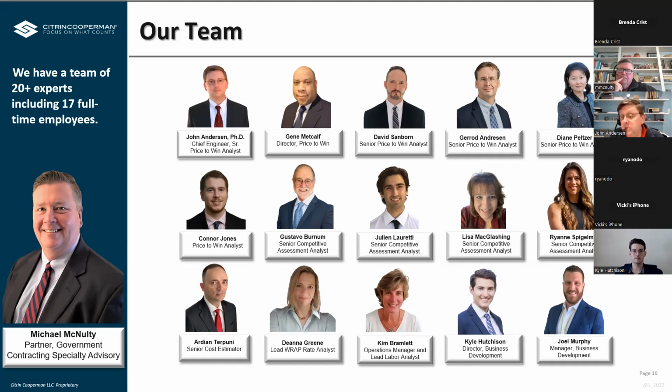Oh no, I'd probably put in higher numbers for the first 2 years, maybe 3, maybe even a little bit more. But then I would try to go back to more historical numbers, closer to 2, for the remainder of the contract, and basically make the claim that. And that will make a tremendous difference. The power of compounding, right, over time on a 10-year program, 2 or 3% over the years is dramatic. So that's a really important point. Right.